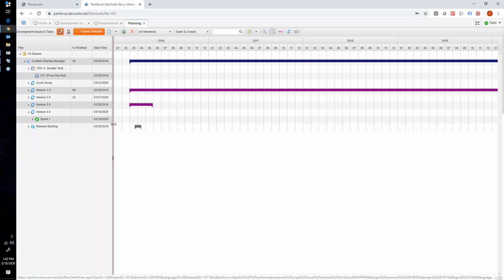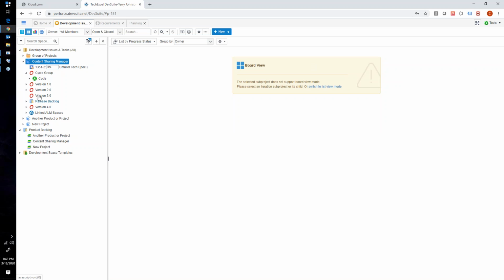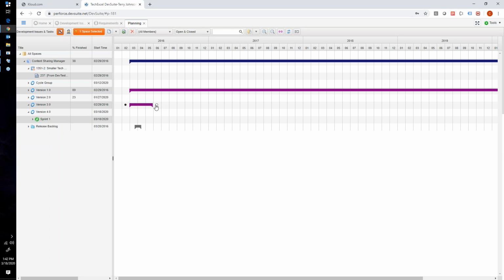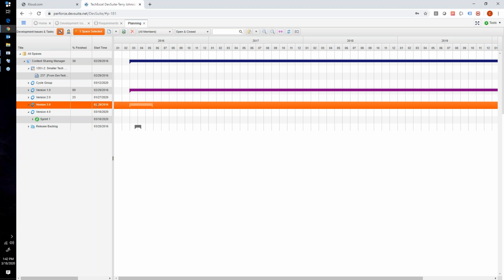If you were doing traditional, then this actually does become a planning view. Say I don't care about Agile, I don't care about any of these sprints. As long as I'm putting in a start and end date for these, you can say this guy is going to be however long. Whoops, I didn't mean to do that. By the way, that line right there allows me to set predecessors, so that's traditional planning. I'm able to specify a start and end date. So I can disable the rollup feature and manually put in the start date and the finish date, kind of like Microsoft Project. Traditionally in the past this was meant for that, but because we have Agile pieces enabled, this actually becomes more of a report.